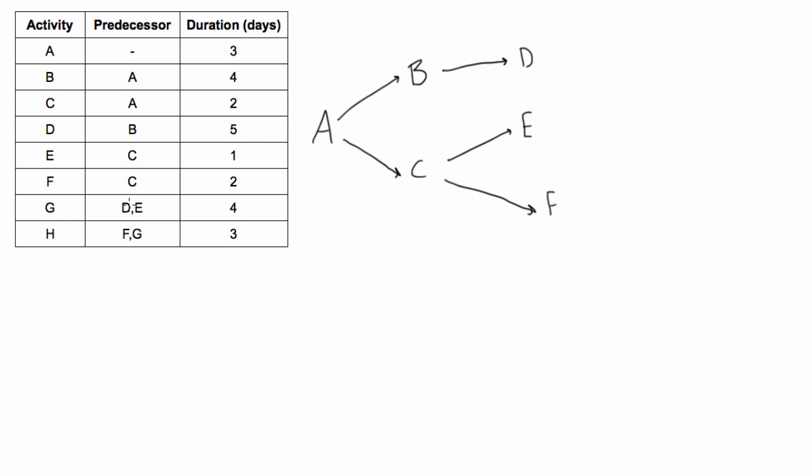Activity G depends on D and E, so once D and E are both done, then we can start activity G.